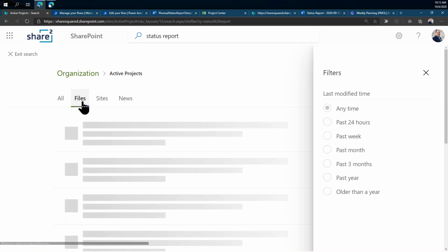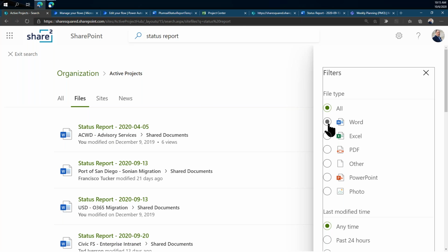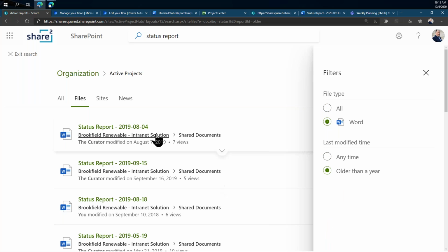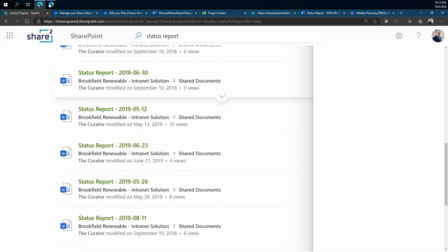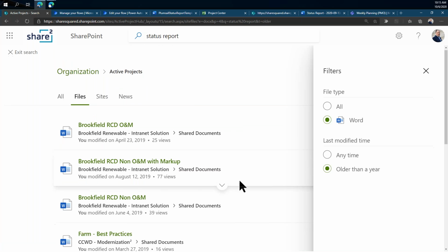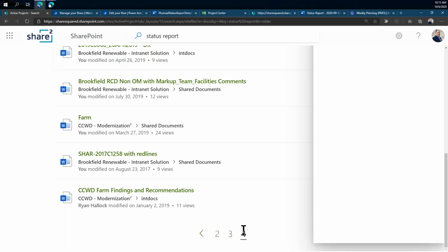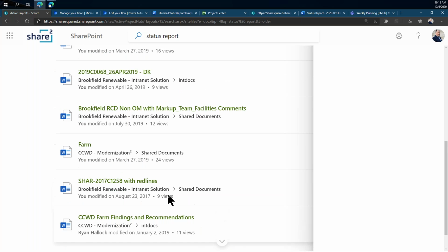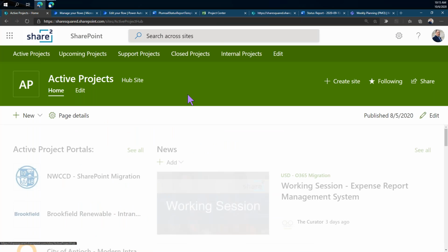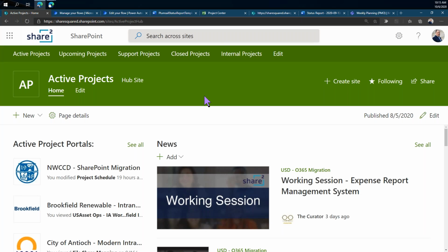And we used to copy the prior week's status report, which was a Word document, go into Project Online, which is how we manage projects, copy the tasks that we completed in the prior period and paste those into Word, and then get the ones that are planned for the next period, period being a week in our case, and paste those in. And so it's a very manual process. It's one of those things that was just begging for a workflow.